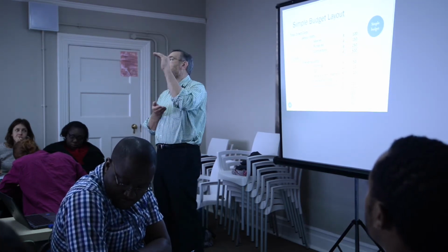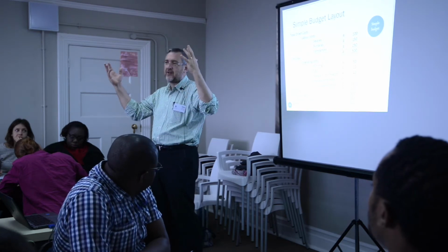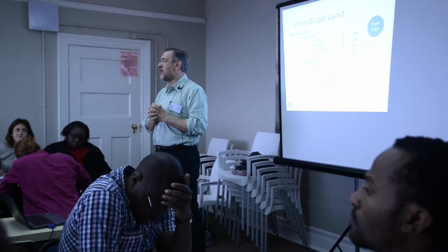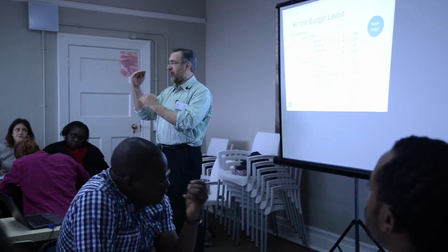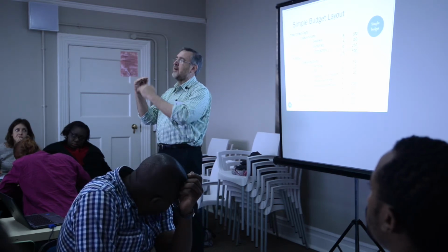So you can't say, oh, interest is extra and a bonus, and I'll do whatever I want with it, related to the project, of course. They become more and more shrewd and tie you into this. In fact, it's one of those grants we also have to contribute 10% of. So of the 12 million that it costs, you've got to say 10% comes from Wits, 90% comes from Mellon. So those things have to be worked in as well.